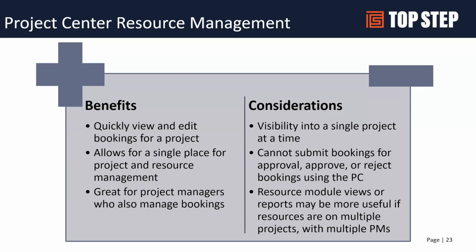Some things to think about when implementing this. It is one project at a time. There's not a global Project Center where you can do any sort of bulk updating across multiple projects. You are updating one project at a time. You cannot use any sort of booking approvals features with this product. So booking requests, or submitting, approving and rejecting bookings, cannot be done through it. You could have that enabled outside of this and still see the data here, but you cannot create and submit bookings through the Project Center.